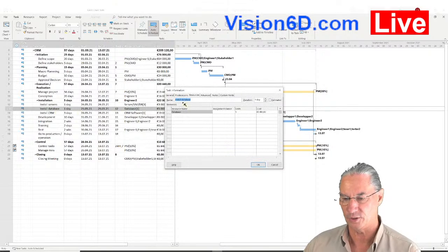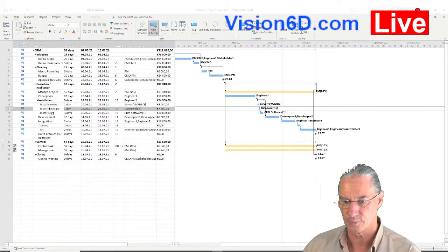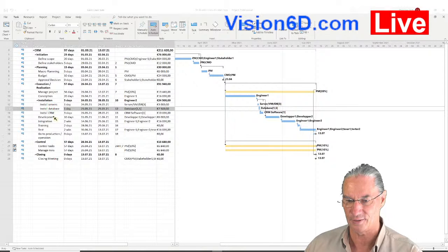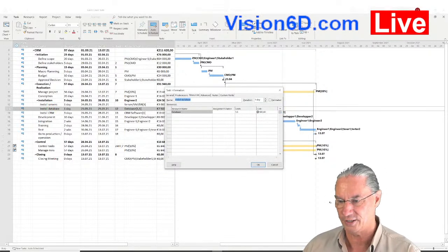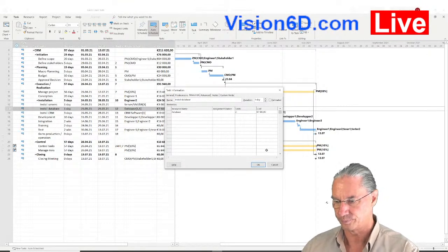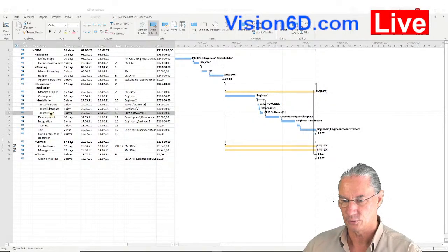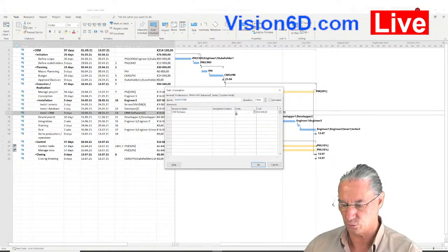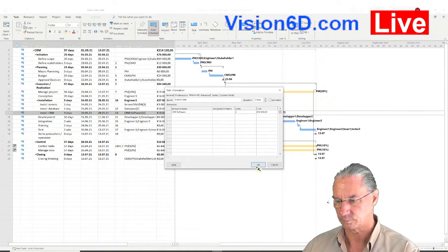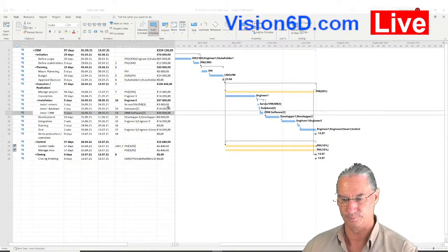So now if I want to see how this evolves price-wise, I will simply come here into the resource and change the unit and increase it to 2. Oops, 1.5. It's difficult to understand what is 1.5 of a database. So I will change this to 2. Okay, and the CRM software, I'm also going to add it and say 2 units. So we see that the prices have doubled here.